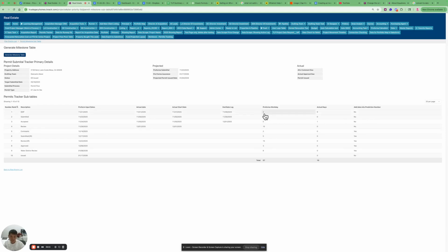So you have the sum of performer here, and then you're gonna sum up these days, okay? You're gonna sum all these days based on this filtering, right? If all of this is yes, then you only sum the yes numbers, and then add in the latest actual date. That will give you the projected date.